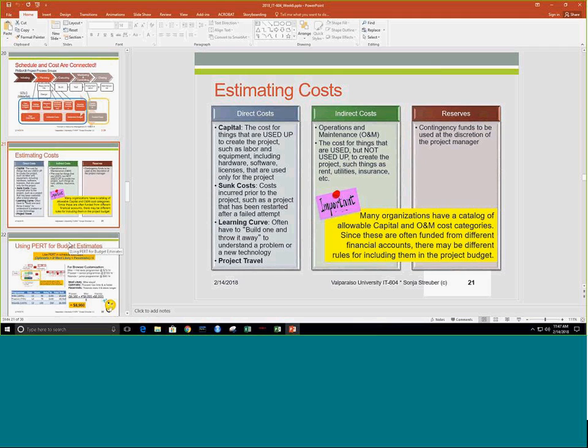The money that they make will be less because the rate always has surcharges for indirect costs, for example, and also things like health insurance or any kind of commission for the HR department, depending on how the rate is calculated. So let's not confuse the rate cost to the project with the pay that the actual team member makes.